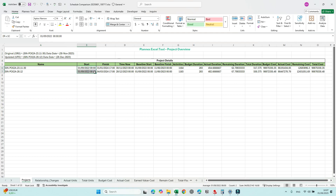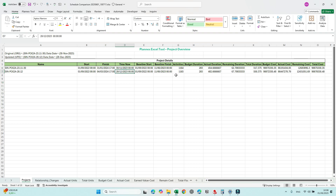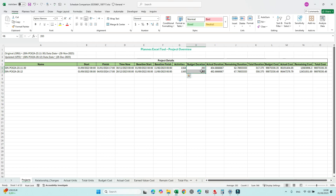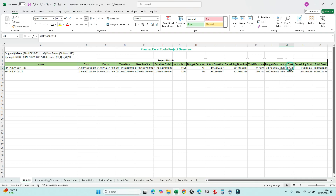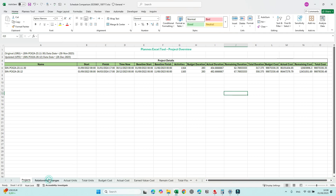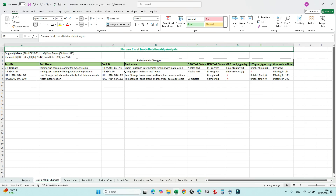Here's the project summary. We have project start, project finish, a shift of around 33 days, and a cut-off date. We can see the number of activities — there is one additional activity we'll check later. The budget duration and total duration have increased. Budget cost has also increased, and we can now understand where that comes from. Actual cost is expected to increase as well, along with remaining cost total.